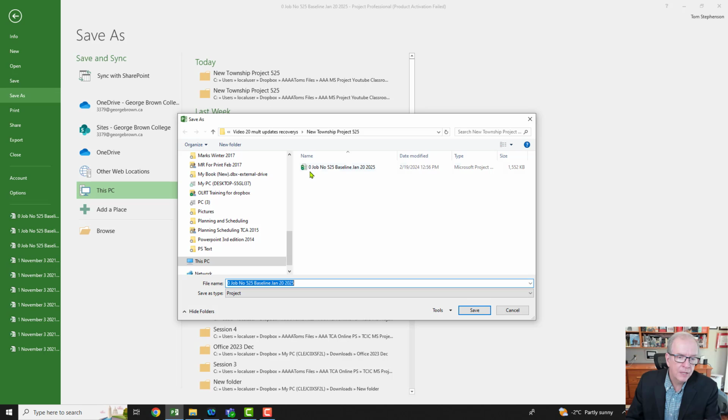The first update we do, I'm going to put a 1 in front of it. The second update we do, I'll put a 2. And that will be just saying this is the second, the third update. And each one will have a date for when that's occurring. I'll also have different naming for between an update file and a recovery file. So you'll see how that sort of plays out.